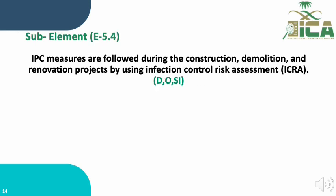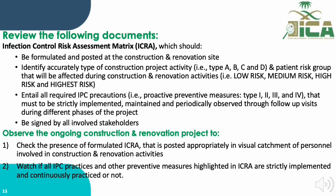Sub-element E.5.4 states that IPC measures are followed during construction, demolition, and renovation projects using the Infection Control Risk Assessment (ICRA). This sub-element requires document review, observation, and staff interview activities. Documents to review include the ICRA, which should specify the type of construction project activity, the patient risk level (low, medium, high, or highest), and the required IPC precautions for Type 1, 2, 3, or 4 based on matching the construction activity type with patient risk category. The ICRA must be signed by all involved stakeholders.